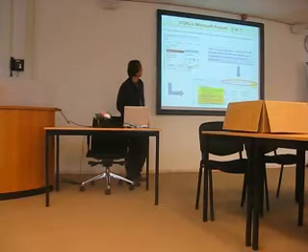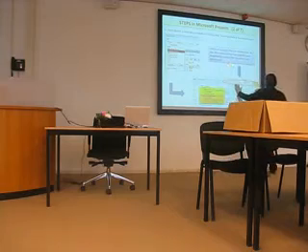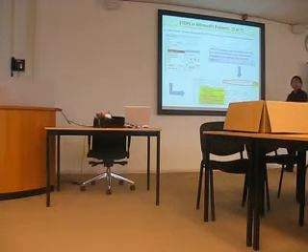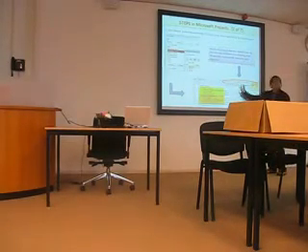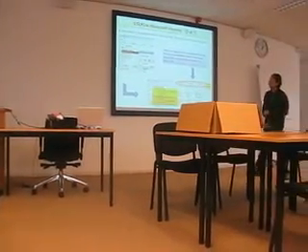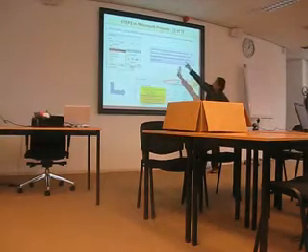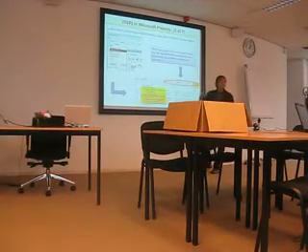Okay, this is the RACI matrix, which covers who is responsible, who will approve, who will be consulted, and who will be informed. Actually, Microsoft Project doesn't have such a feature, but sometimes Microsoft Project can extend its features. It's called a custom field, custom report.